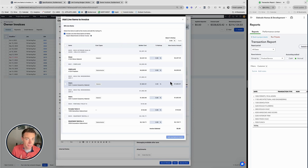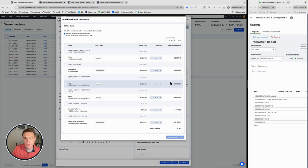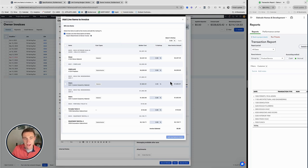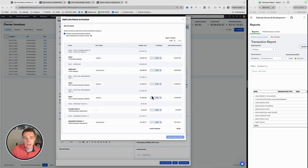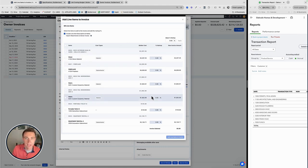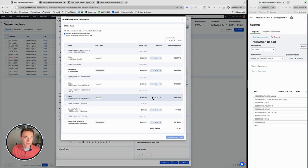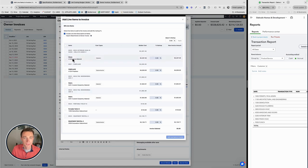We can't, I can't do it for everything because we go to the store, we go to Lowe's, Home Depot, we're swiping our card. Those are QuickBooks expenses. I'm going to show you those next. We can't do it for everything. I don't think you should anyways, but we can do it for a lot of bigger ticket items, usually thousands of dollars or so. We would rarely have a bill here for like $12 and 58 cents. Those small transactions are typically going to be tracked in QuickBooks and brought over.